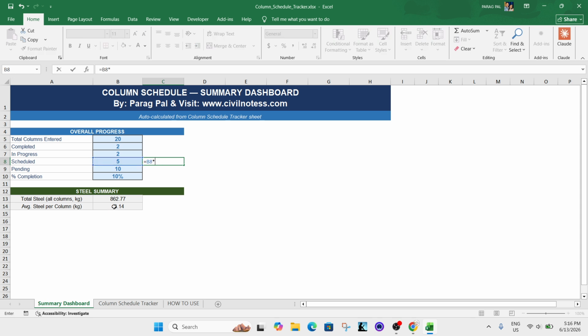by, on an average, you can consider the steel. So you have a tentative idea that at least 215 to 250 kg of steel is required for this kind of construction work. So you need to make sure that this amount of steel and the material of cement and aggregates are available, so that the schedule can happen properly, right? So there won't be delay.